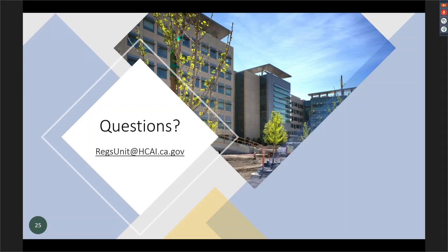Next question for you, Richard, is I'm not understanding how this form is different than the RFI. The RFI has the same information. It has a different number on it. It has an RFI number on it. We need an NMA number. Could be the exact same form. It doesn't have to be, but it has to be specific to an NMA.